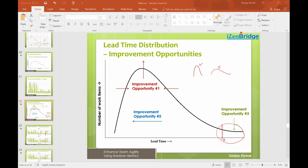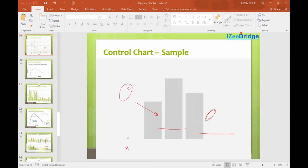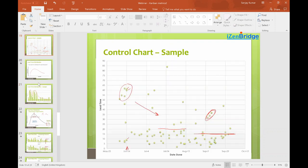Question: why is it called a control chart in Kanban if we're not using mean, upper limit, and lower limit? It's also called a run chart — it shows a running summary of how lead time looks over time. So it goes by both names: run chart and control chart.